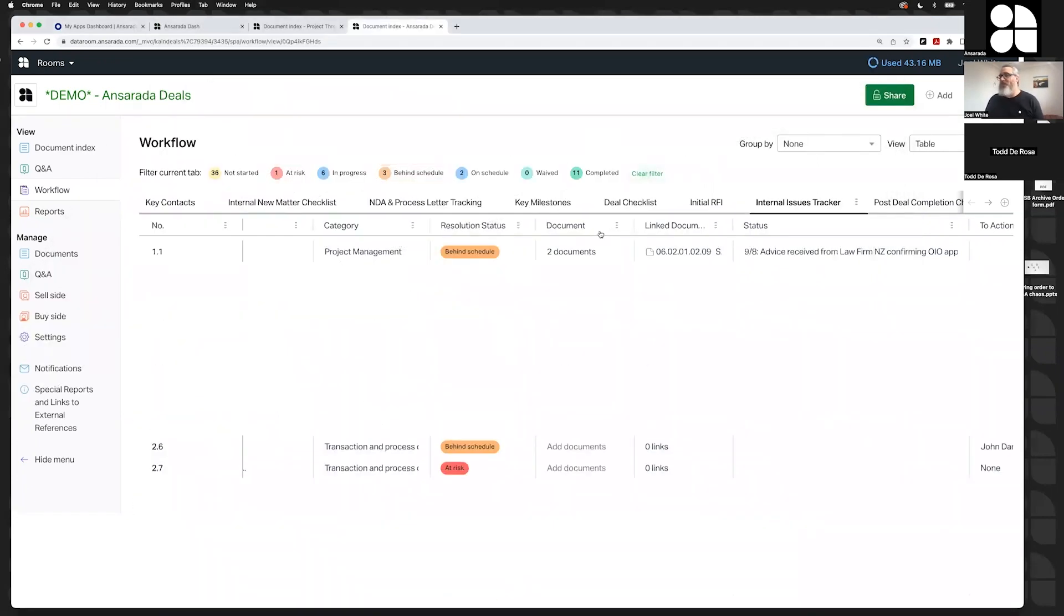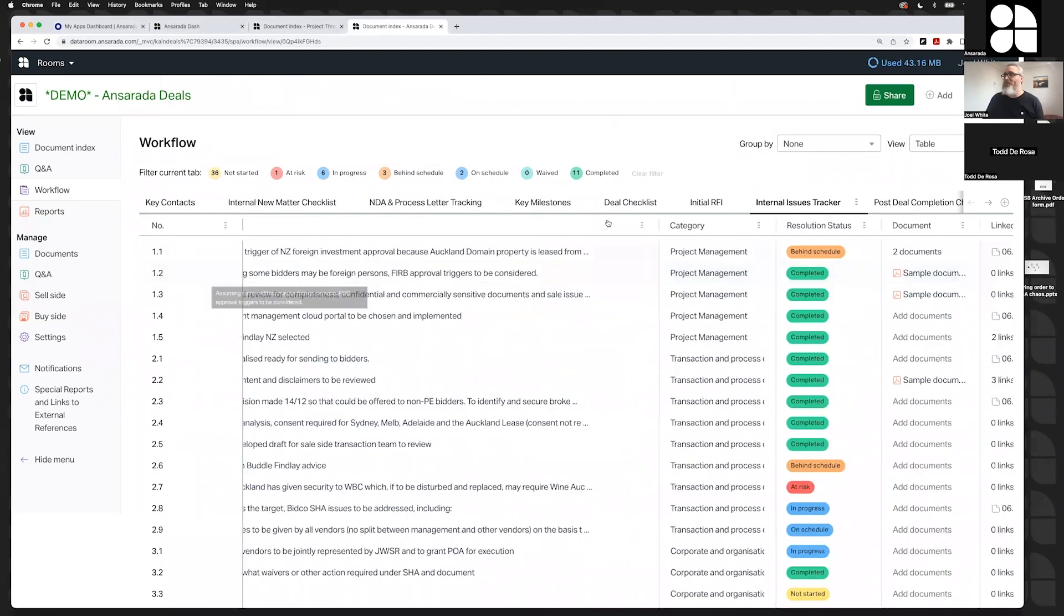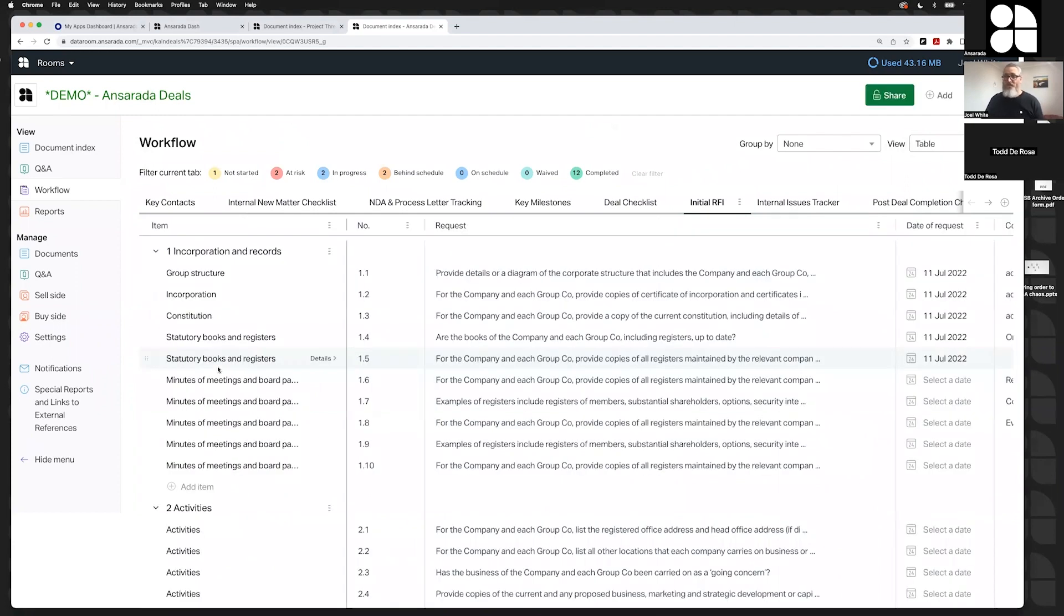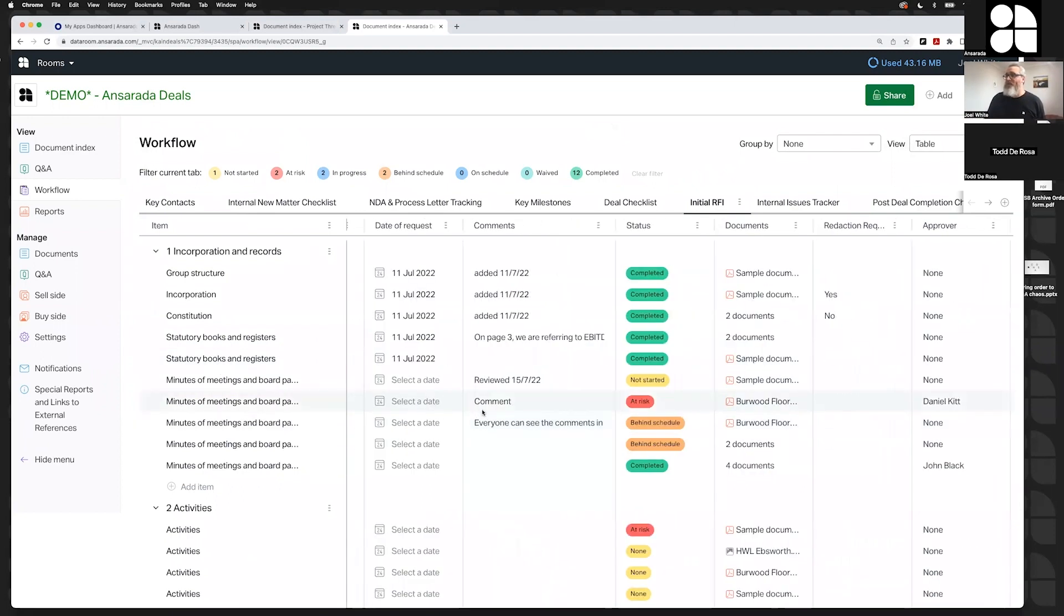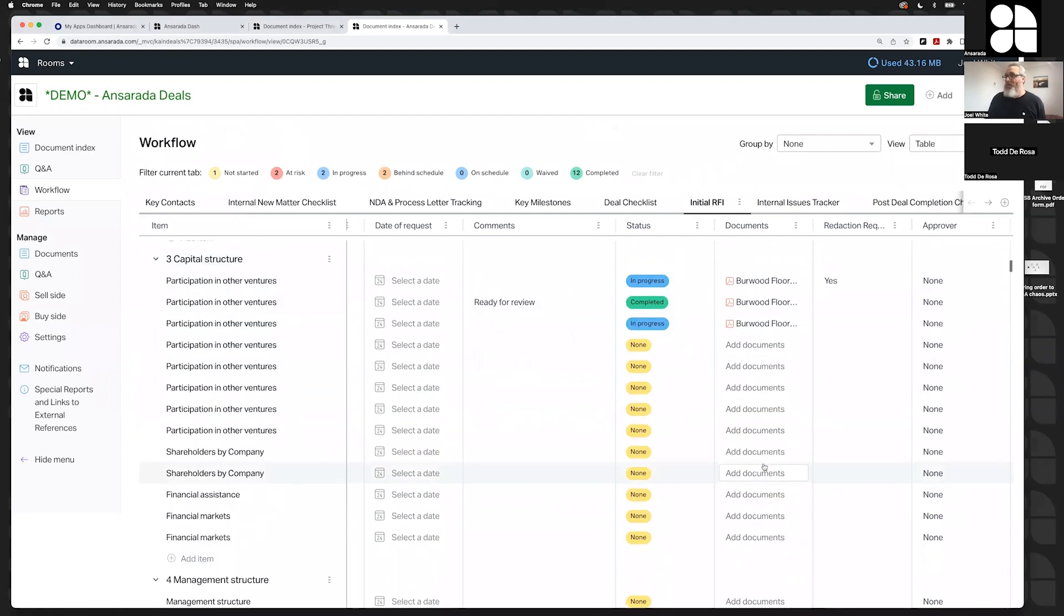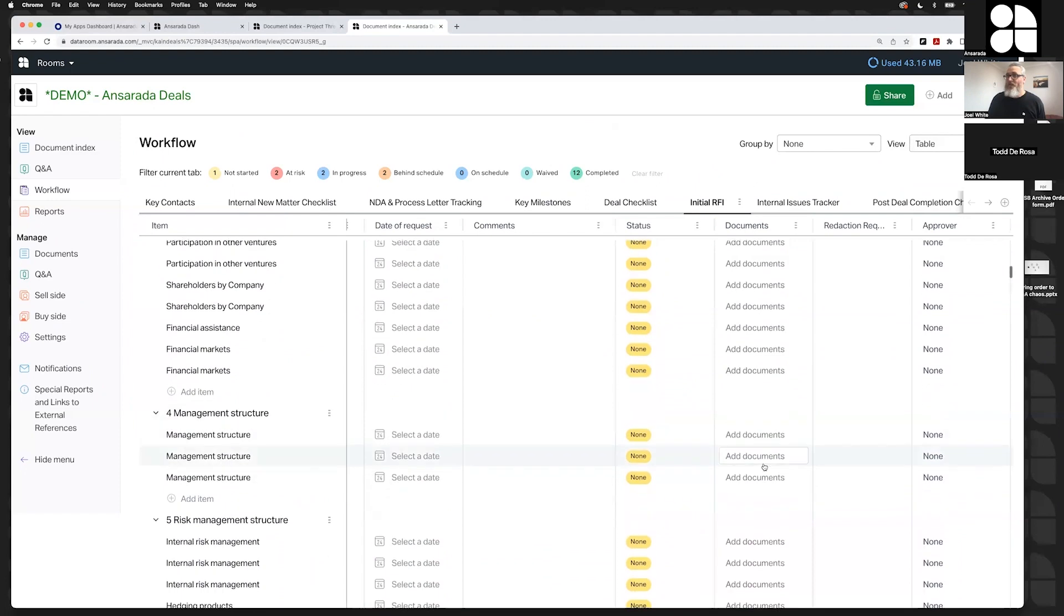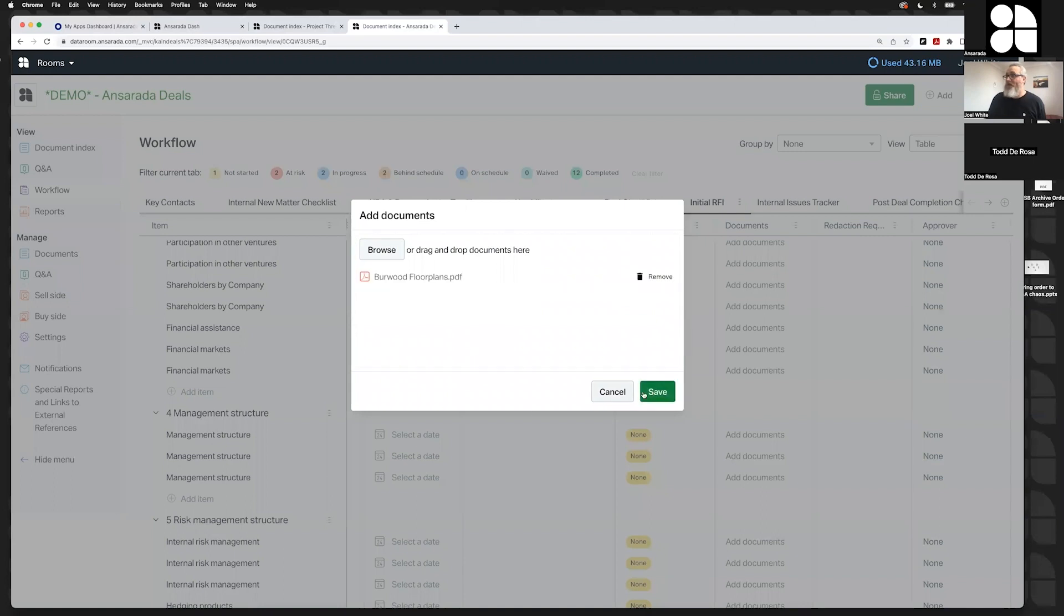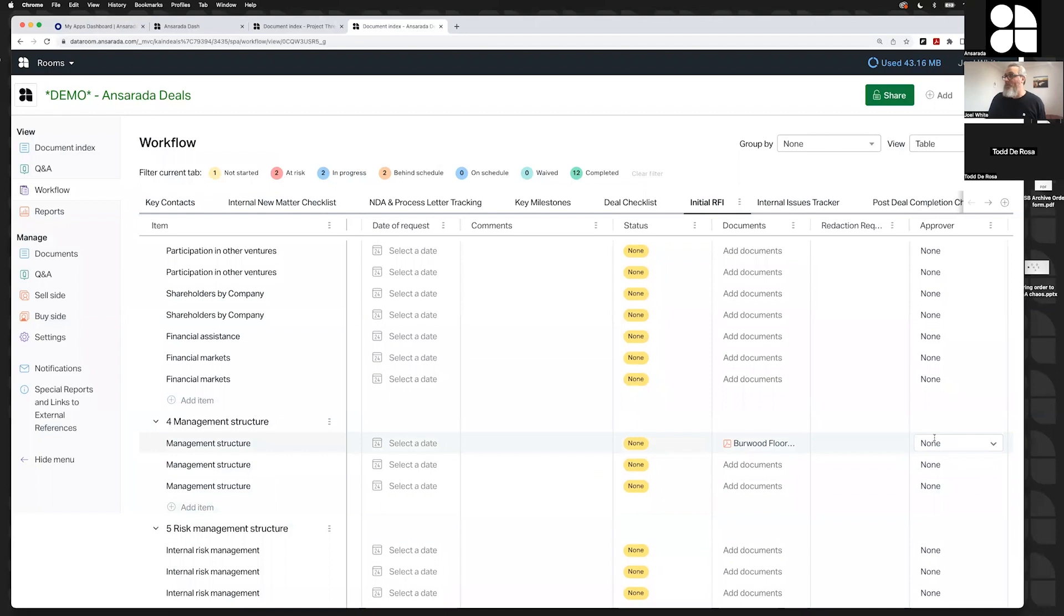Other things we can do - the second we translate something like a request for information list into this online landscape, instead of trying to manually update a document and then put the document somewhere else, it's online. So you can add things like document columns into your spreadsheet tracker, and it will allow you to upload the documents directly next to the line item when we're talking about it. For example, if you've requested that your client provide the management structure diagram, they can literally come in here, add the management structure diagram, and tag you in to let you know that it's there.